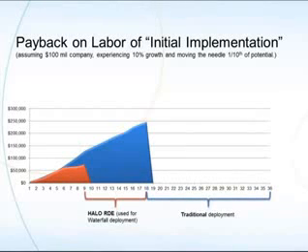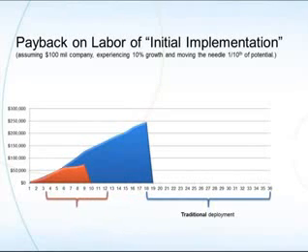When it takes you 18 months to deploy it, your payback is much longer. In this particular case, it would take you 36 months to pay back your initial investment. And that's what traditionally people are finding. But if you use an agile method to do the implementation, what happens is that the payback happens much sooner, and essentially, if you work very effectively, you could possibly pay back the investment that you have in the BI project by the time the full thing was implemented.